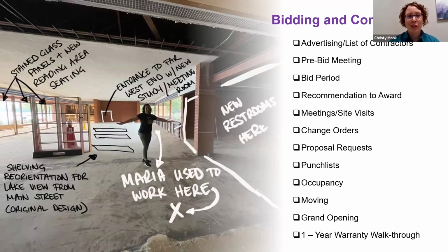Then you get out those gold shovels and you have your groundbreaking and you start your construction process, which whenever I do a construction process, it always seems like it takes a little while to get started. So don't expect it to start the day after bids or the day after the contract. It takes a while to get it mobilized and to get a contractor on site, get the fencing, get all the ducks in a row, so that you can then start your regular construction meetings, typically every other week, depending on your contract with the architect.